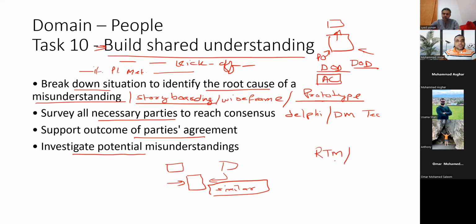which we use in our predictive project management, where on the left side we have objectives. On the right side, what do we have? Test cases. So it means there is a common misperception, or the things were not shared, or they had different understanding. So the requirement traceability matrix, definition of done, or acceptance criteria should always be evaluated.